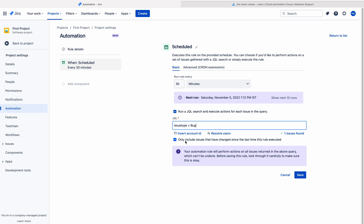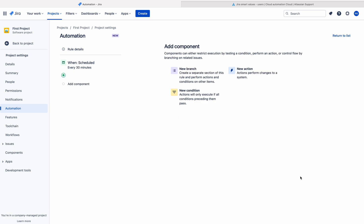See here the option 'only include issues that have changed since the last time this rule executed' — it is better to uncheck this. Otherwise the automation rule tries to find issues updated within the last 30 minutes and will not fetch all relevant issues. So just uncheck this and save the trigger.